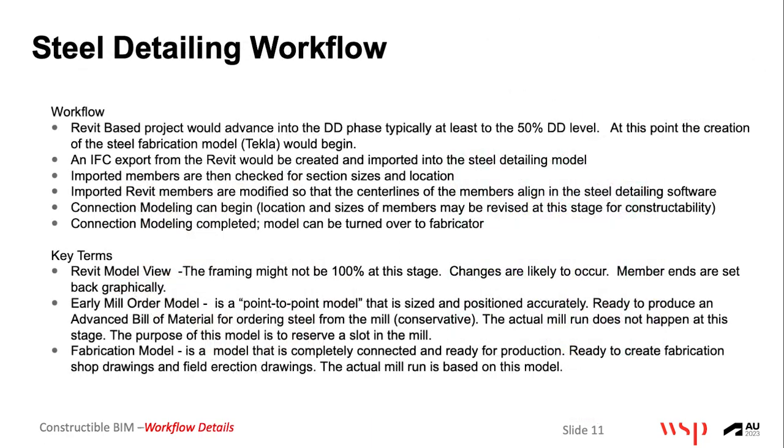So, the workflow, let's do a brief summary here. You know what they say when you do a presentation, never read what's on the screen, but I'm going to read what's on the screen. A Revit-based project would advance into the DD phase, at least to 50% DD. Now, that's the first rule we violated here. We started at the beginning of DD with the process, but it's okay, as long as everyone is in sync, the design team, everyone working together. You know what the schedule implications are, and you know when you need your information.